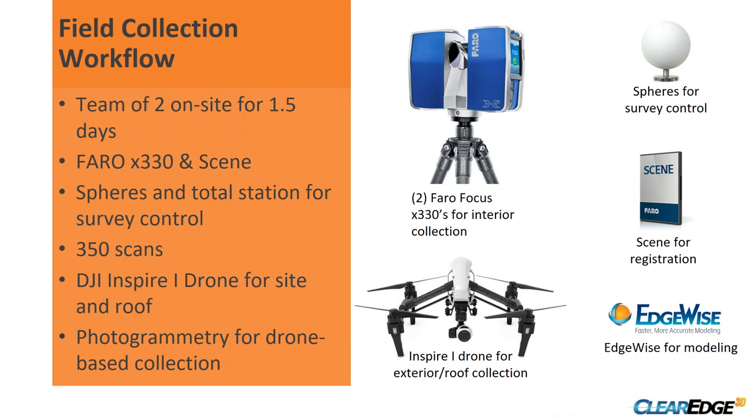And we had access to a surveyor who was also on the project performing survey on it. So we had him shoot some additional targets for us, and we went ahead and tied that registration and the survey control together, and we had everything on the same coordinate system with the engineers, the architects. Over about a day and a half, we took 350 scans, so it was relatively quick.